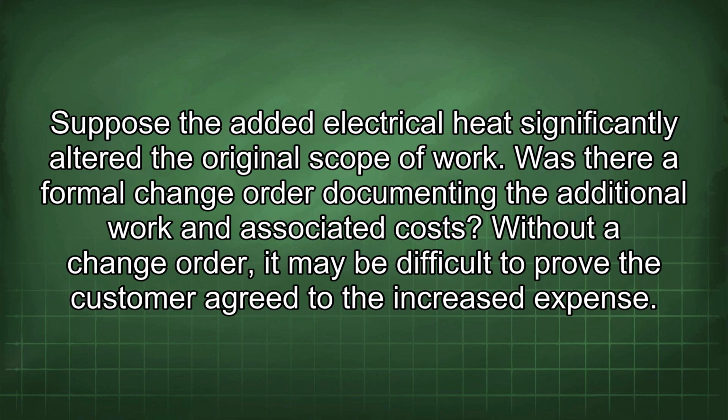Suppose added electrical heat significantly altered the original scope of work. Was there a formal change order documenting the additional work and associated costs? Without a change order, it may be difficult to prove the customer agreed to the increased expense.